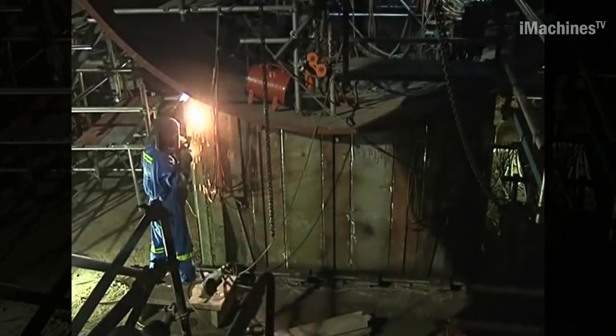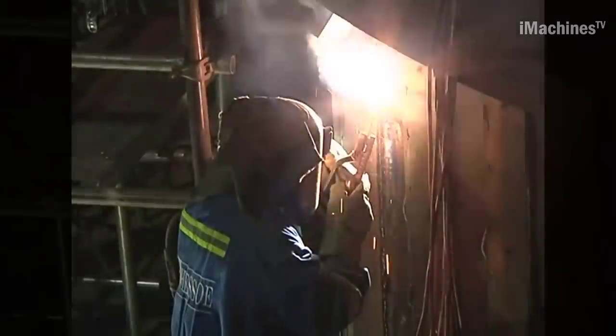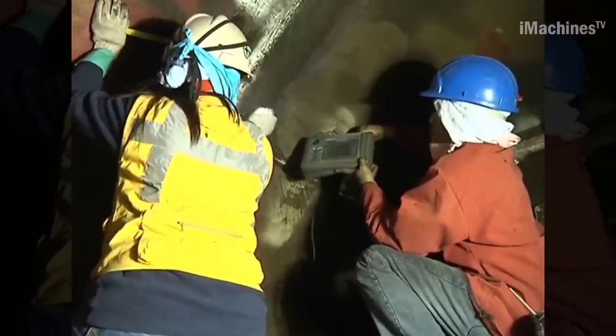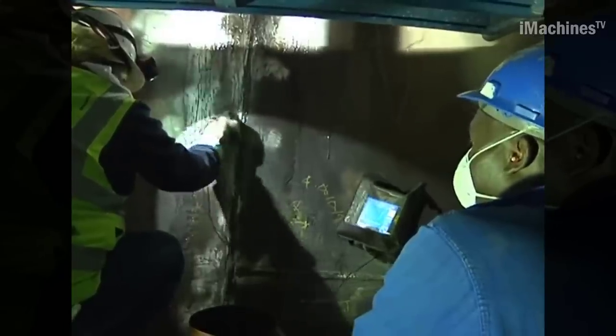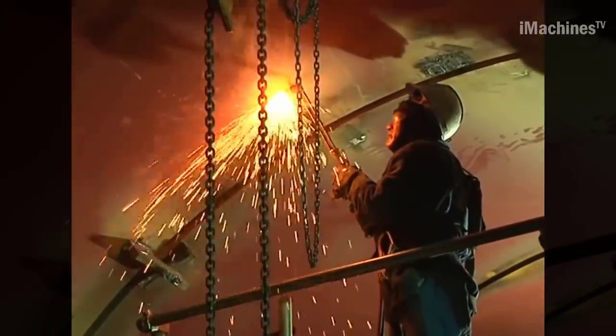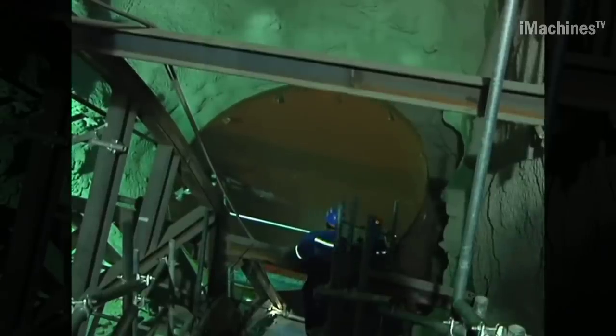The project placed great emphasis on safety, and Whessoe adhered to all safety standards and policies. No fatal accidents or serious injuries occurred during the construction process. Additionally, as part of their commitment to leaving a legacy of trained personnel, Whessoe trained and employed 53 local individuals in various roles, including machine welders, blaster painters, riggers, scaffolders, fabricators, and heavy-duty drivers.